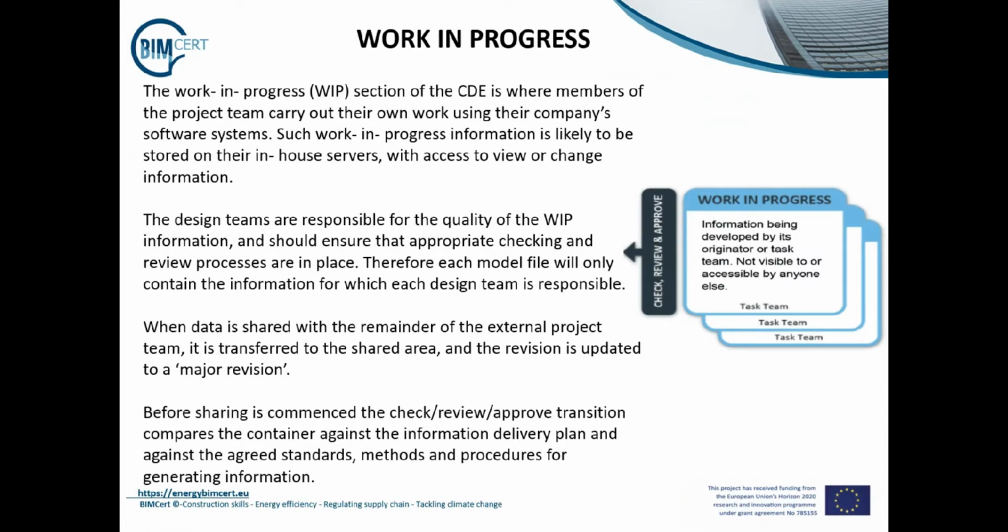The work in progress section of the common data environment is where members of the project team carry out their own work using their company's software systems. Such work in progress information is likely to be stored on their in-house servers with access to view or change information. Design teams are responsible for the quality of the work in progress information and should ensure that appropriate checking and review processes are in place. Therefore, each model file will only contain the information for which each design team is responsible.